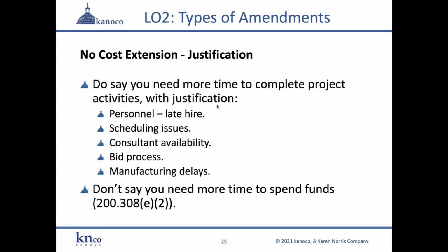I mean, that's basically what we all have to do. We need more time because we have money left over. We need more time to spend the money, but the uniform guidance is very specific. No, that's not an appropriate justification for extending a project. Why didn't you spend the money? Oh, I ran into an obstacle.